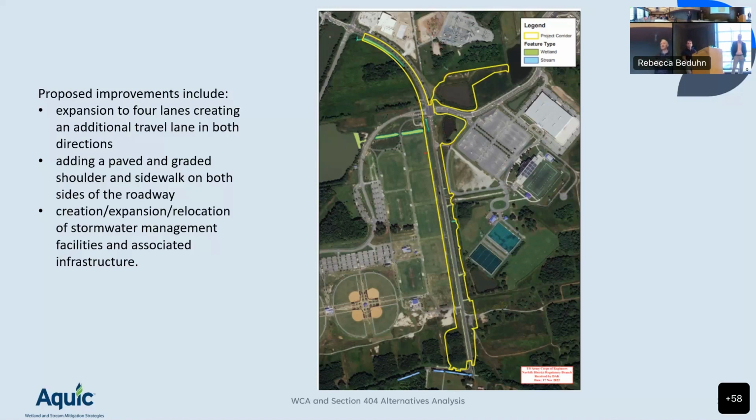Had a really good project review on the North Shore last year where they showed us their model of, they dropped water and had it flow down and said, this is what it's going to look like. This is why we need that infrastructure right there. It made sense. We are near a really good resource with Lake Superior being right next door. It made total sense why they were asking for those impacts. So this is where it's really important for you to lay out what your requirements are and your rationale behind it, what your constraints are.